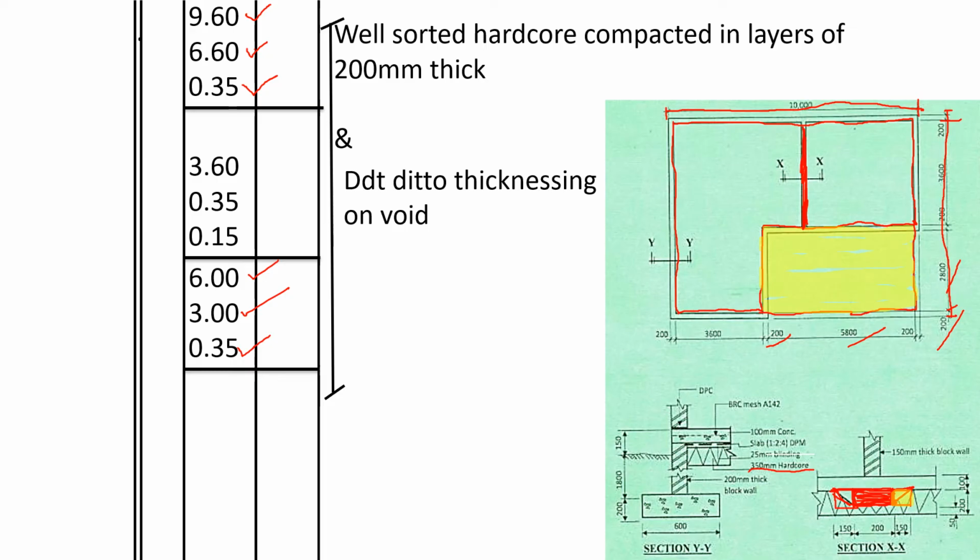The two triangles will be measuring, the base is 150. The base is 150 here. The depth is 200 minus 50, 150. So you can see it's a 150 by 150. So it can form a square here, 150 by 150, made of two triangles.